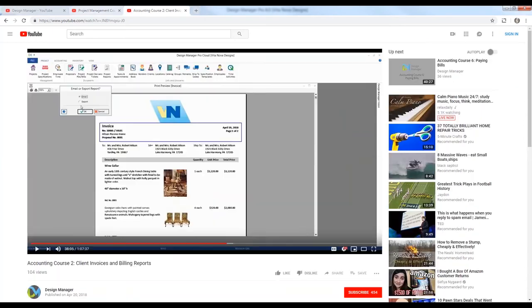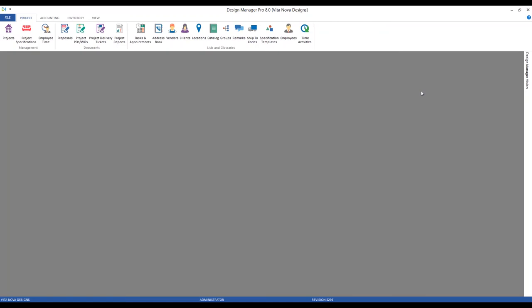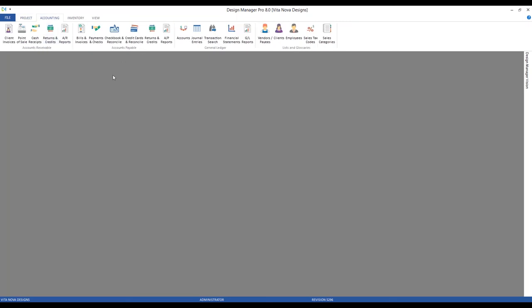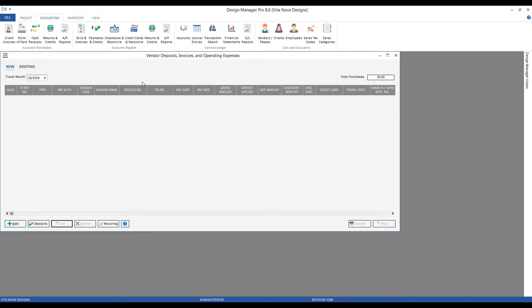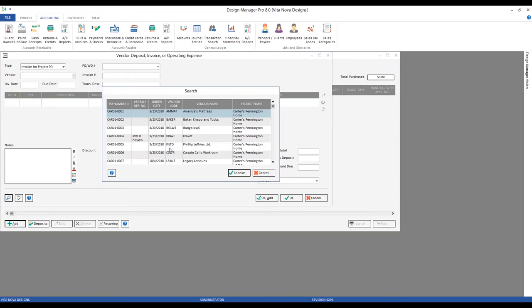At this point we've been focusing on what we believe or presume the freight will be — what the vendor has indicated as a forecasted freight cost. In Design Manager terms, this is the estimated cost of the freight. The actual cost of the freight gets recorded when we enter the vendor invoice or vendor bill for that freight. This concept of estimate versus actual freight will also come into play when we discuss invoicing the client for freight charges. Let's imagine we have some bills to enter that include freight.